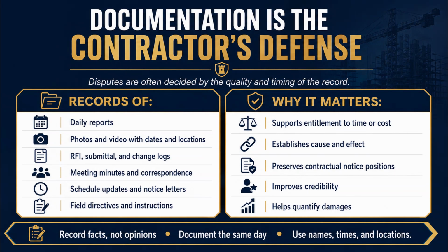Here's where you see why it pays off. Records of. What do you keep? Daily reports. Photos and video with dates and locations. RFI, submittal, and change logs. Meeting minutes and correspondence. Schedule updates and notice letters. And field directives and instructions. That's everything we've built across this entire unit, gathered in one place.